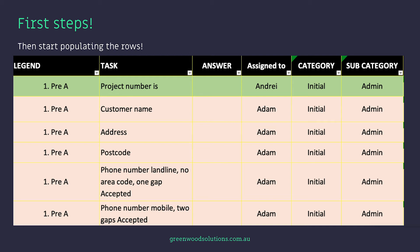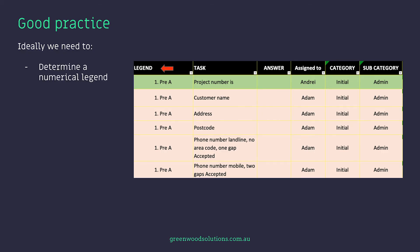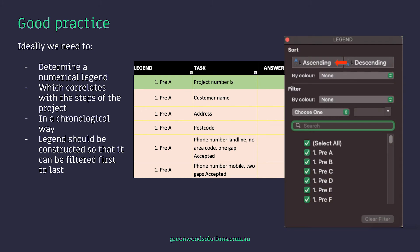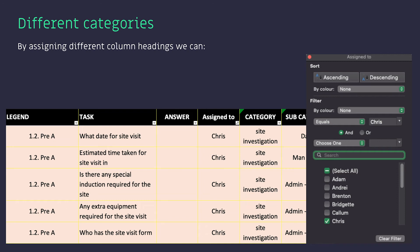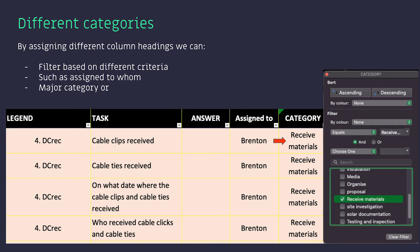As you can see here, we've got a legend, a task, an answer, and a few other columns, and we've populated them. For instance, task project number is there with no answer, assigned to Andre. I've actually created a main category and a subcategory, but you could drill down and create another subcategory — it just depends on how much information you want to extract from your spreadsheet. Just be aware, don't go overboard. Ideally, we need to determine a numerical legend, which is very important — it correlates with the steps of the project in a chronological way. The legend should be constructed so it can be filtered first to last. By assigning different column headings, we can filter based on different criteria, such as assigned to whom, a major category, or a subcategory.